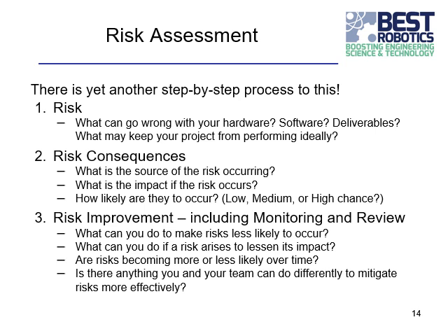So using the wheel example of not getting traction, the risk is your wheels spin without moving. And so that would be a friction component. Your wheels don't have enough friction. What's the impact if it occurs? You don't move, which is not good if you need to move to score points. And how likely is it to occur? Well, depending on maybe your expertise, the capabilities of tools you have, that may vary.